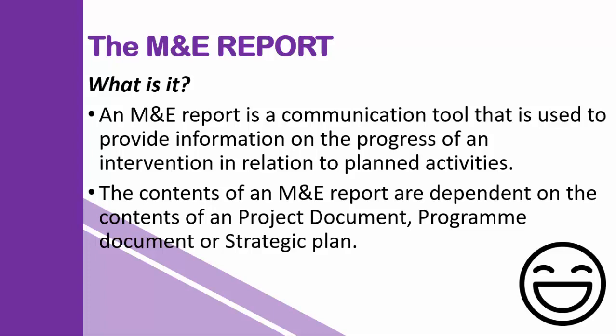Now there's something we need to understand here: the M&E report is really dependent on the project document, program document, and strategic plan. And why do I say that? It's simply because these documents have the key performance indicators, which I've always talked about. So whenever you're doing a report, make sure you don't spend time reporting on things that are not really answering the needs of the project.